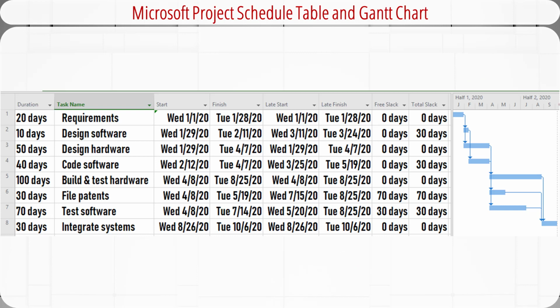All of the tools and techniques discussed in this video can be implemented with computer software like Microsoft Project. Microsoft Project will do the calculation automatically and show you the final results and the network after you type in the start date, the time unit, and the duration of each activity, as well as non-work days and sequencing of the activities, etc. For example,